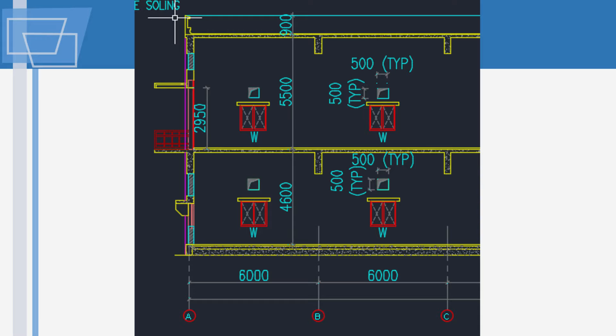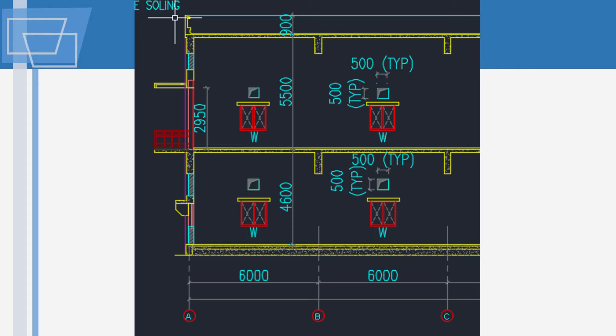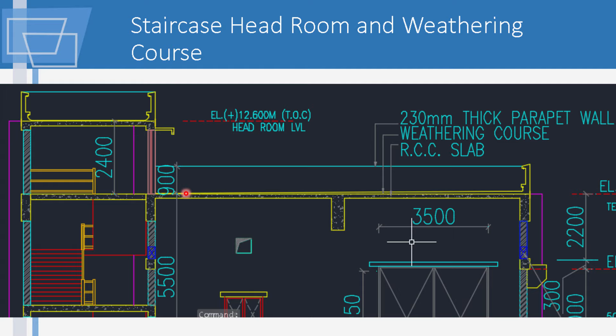In this drawing, we have some windows and the elevation markings. Windows are many times measured in numbers — the number of windows and the size to which they are done. There could be openings for ventilators as well. One of the important things this drawing provides is the specification. It says you will have a weathering course, an RCC slab, and a 230 mm thick brick wall. Specifications include anti-termite treatment, painting, jointing, and miscellaneous items.